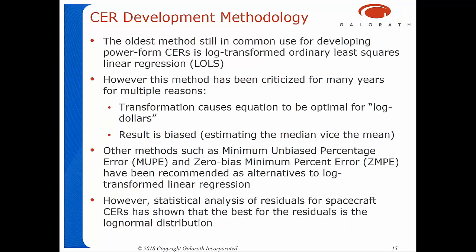Okay, the CER development. The oldest method still in common use for developing what we call power form CERs, equations like y equals ax raised to the b, and the most common method is to do log transformed ordinary least squares, LOLS. It's been criticized for many years for a lot of reasons. The transformation causes the equation to be optimal for log dollars. We don't spend log dollars, we spend actual dollars, and the result is bias. When we transform it back to linear space, we're estimating the median instead of the mean.